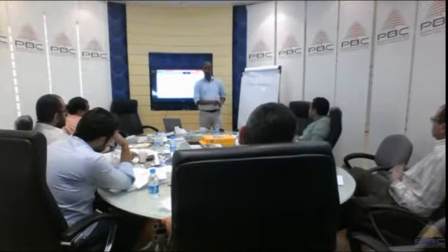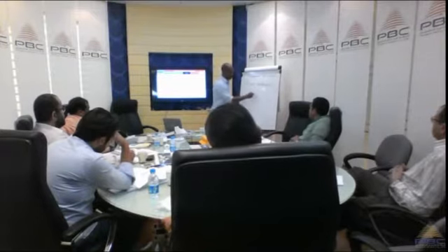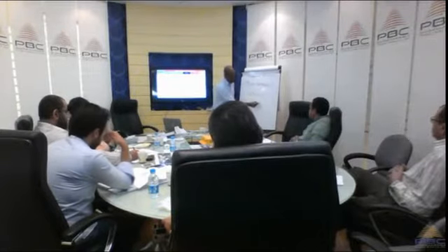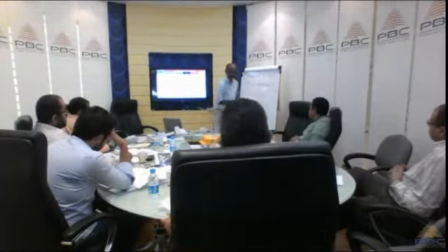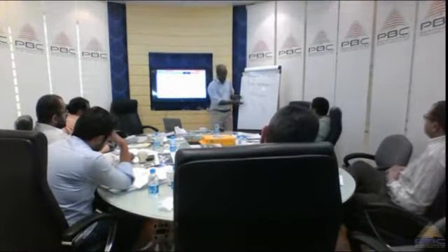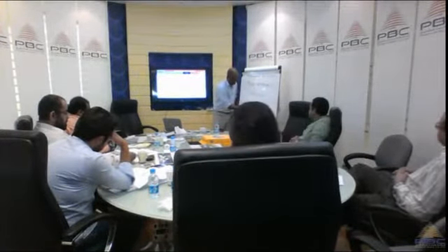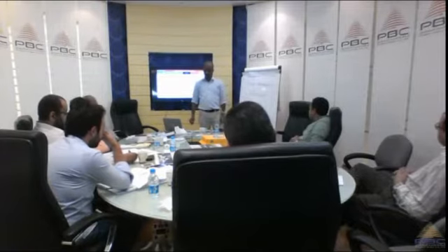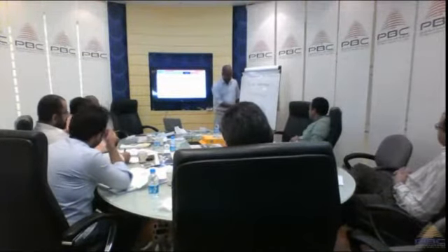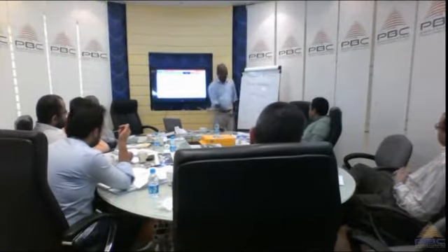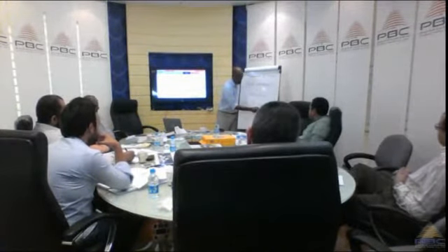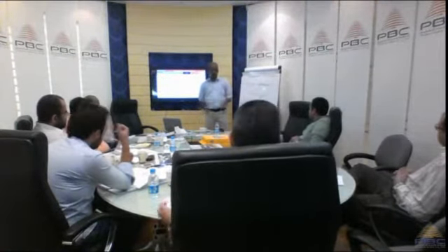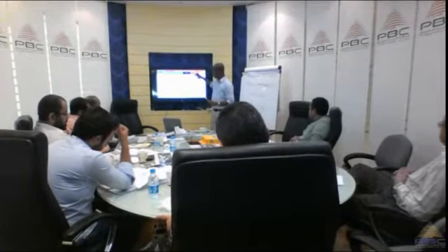So control here, it's very important that a project manager should be given a level of tolerance for scope, cost, and schedule by senior management. It means if, Bashmuhandis Ahmed, you have a deviation of cost plus or minus 10,000 riyal, it's fine. You don't have to go back to me. You work it out yourself. If you have a scope deviation of plus or minus 10%, that's fine. If you have a schedule variance of plus or minus 5 days, fine. Don't escalate it. This is called the tolerance level given to the project manager.